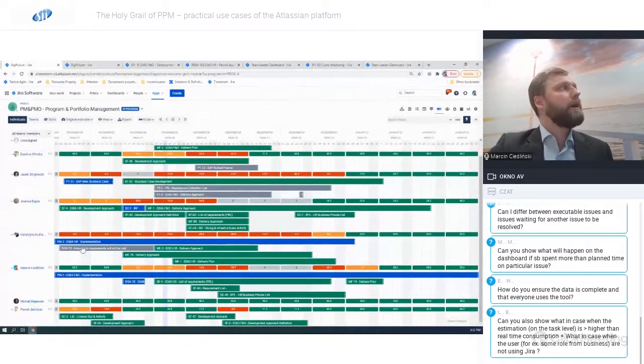What else can I do? Now look at Michael Majewski here. He's a new member of our team, and Michał has not been assigned any tasks yet. So he's on the team, but he's not doing anything. Right? Okay. And I can see a lot of other people are actually red in multiple weeks. So probably Michał can help us with some work. I can see Joanna here is really heavily over allocated in week 49. So let's help out. Let Michał help out Joanna.